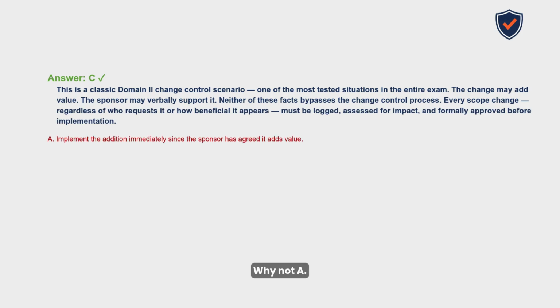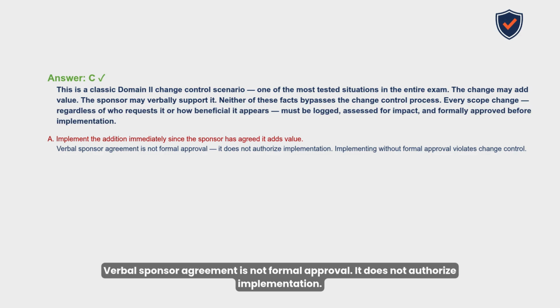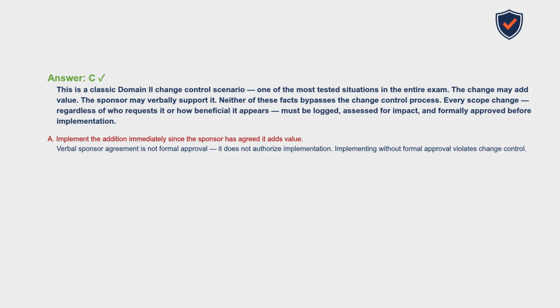Why not A? Verbal sponsor agreement is not formal approval. It does not authorize implementation. Implementing without formal approval violates change control.